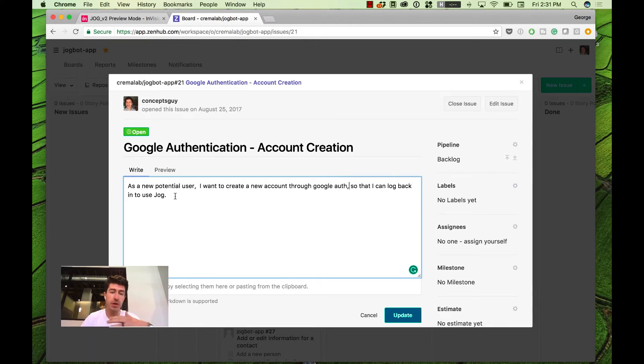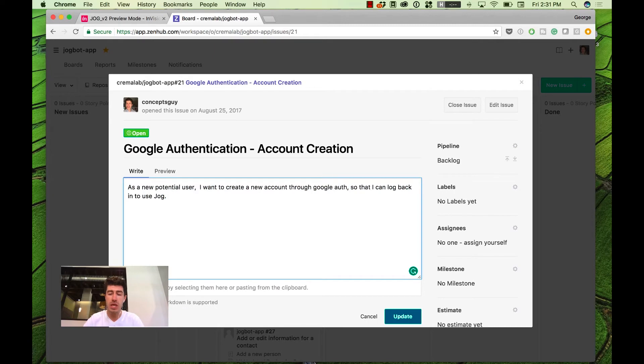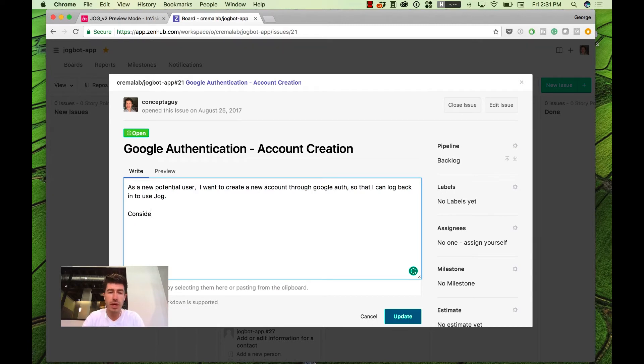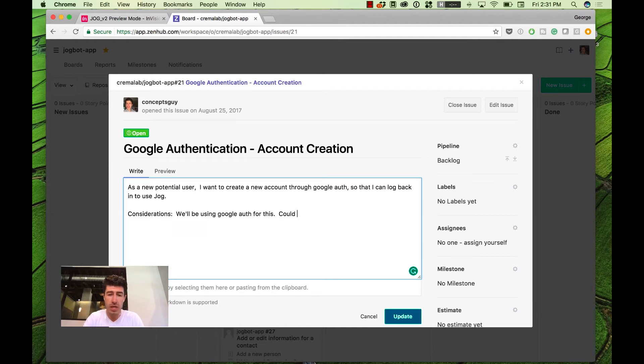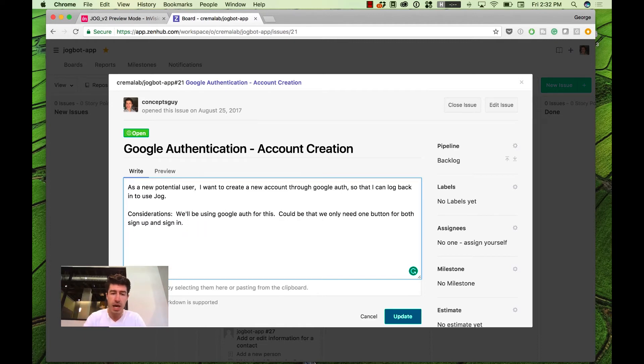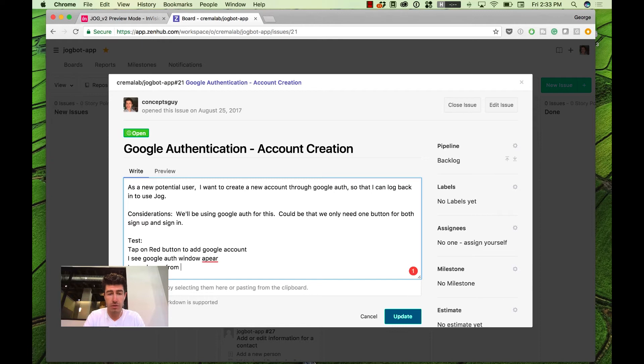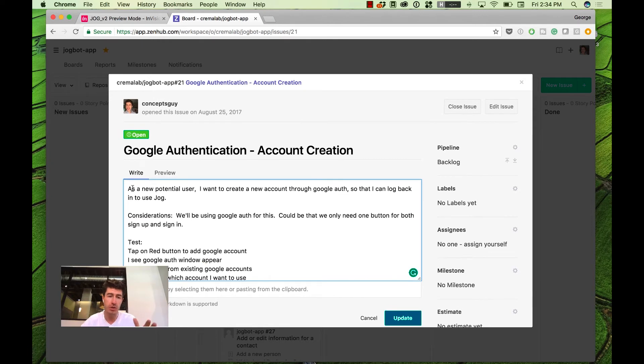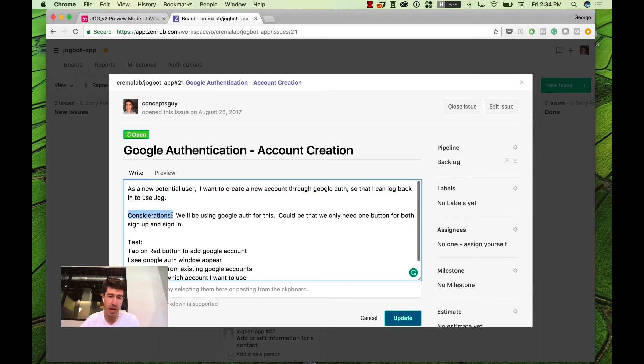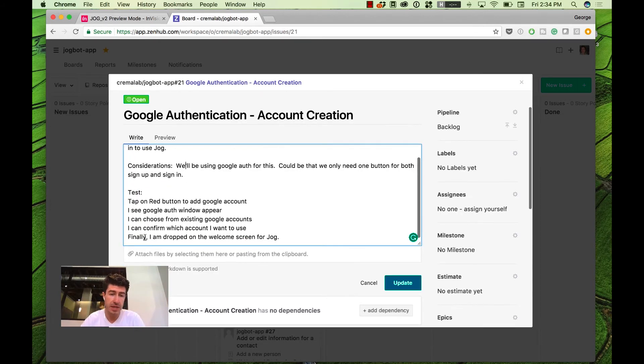Now, this is all that really needs to be written. But what we'll do as a team is we'll write a few other things into the description. So we'll write something like this where we'll go in and say considerations. And then what we would do is we would hand it over to our quality assurance specialist that would actually write through the test for that. So we want to make sure that there's a good, well-written story. There's some considerations around that story as to what makes it important. And then there's some test cases here where we can say, this is how we break it down.